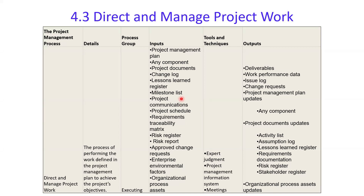Additional inputs include the requirement traceability matrix — defining what requirements you'll work on — and the risk register. If a risk was not mitigated and becomes an issue, it becomes an input to Direct and Manage Project Work. Approved change requests and organizational process assets are also inputs, representing the different sources of work coming in.